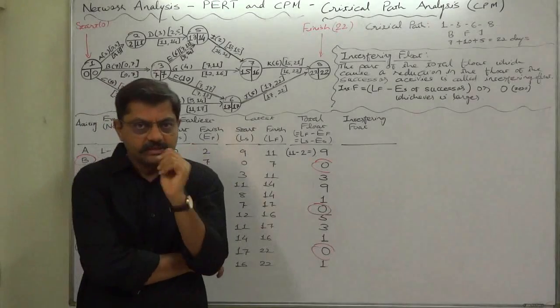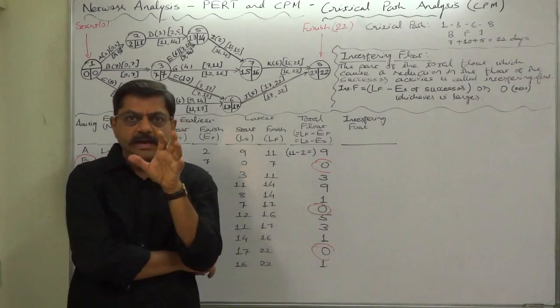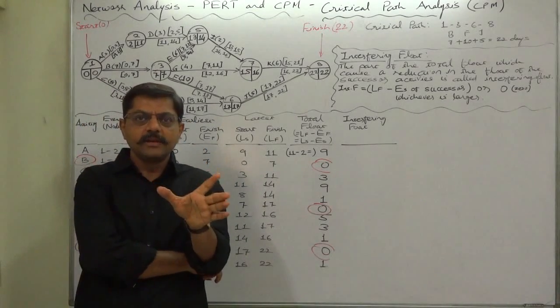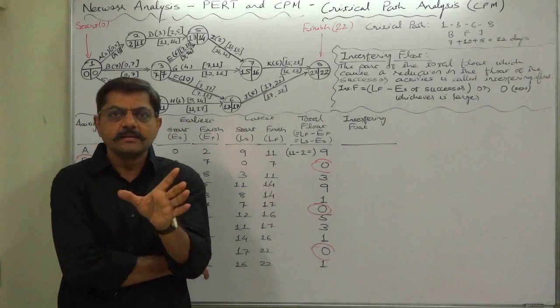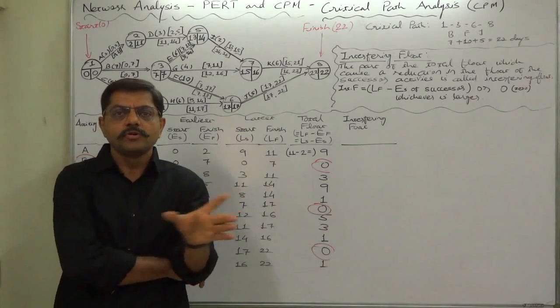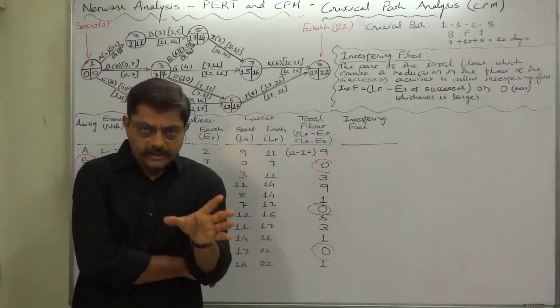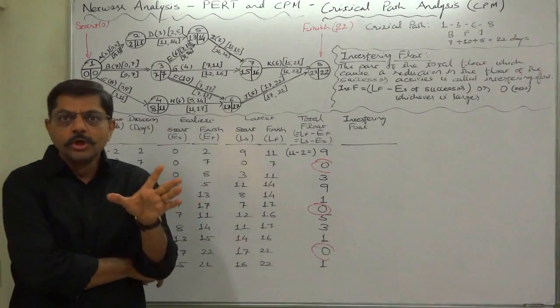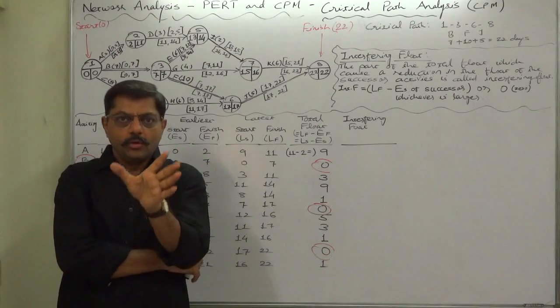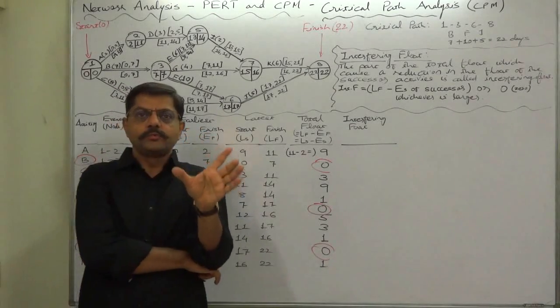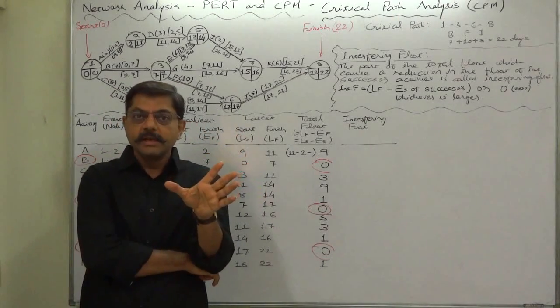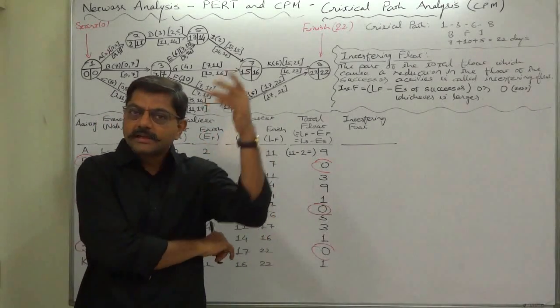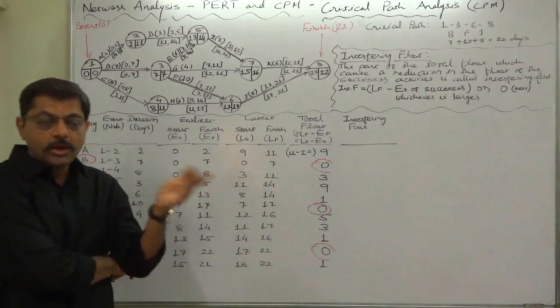As we have already discussed, by the term float we mean the free time available to a non-critical activity by which we can delay or extend or postpone the activity. But is it possible every time to delay or extend or postpone a non-critical activity without disturbing the floats of other, particularly successor activities? No.